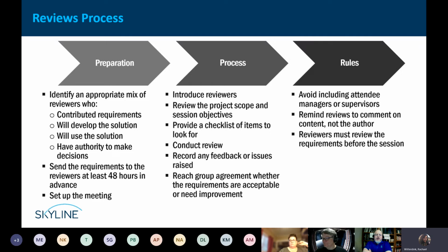The question occurs to me, Rachel, on this kind of review process, as I've refined how I might want to do the kind of review or after action or a hot wash, because they can get to be charged or political or uncomfortable, they tend not to happen. So I have moved in the direction where I try and err on the side of keeping it light, quick, no more than half an hour. It's not about finger pointing or this and that. It's just about can we grab some brainstormy improvements and get people in a room, or stakeholders, to contribute a review or a lessons learned, rather than a huge process.